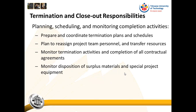The responsibilities in termination and closeout for the planning, scheduling, monitoring, and completion activities include preparing and coordinating termination plans and schedules. The project manager has to prepare a termination plan — when is this project going to terminate and according to which schedule? You also need to plan to reassign project team personnel and transfer resources, because projects are temporary endeavors and it is the responsibility of the project manager to ensure resources are reassigned elsewhere in the organization.